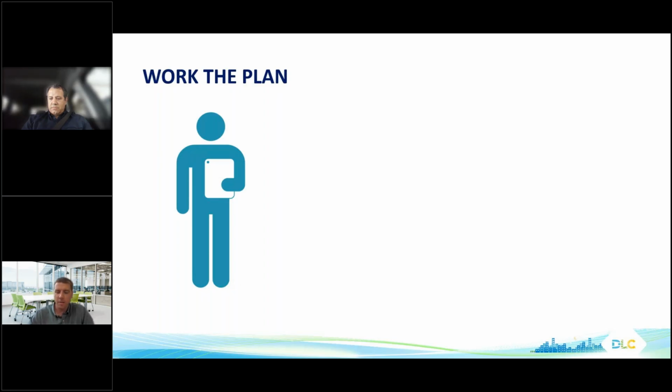And then lastly, communicate the plan to all the relevant parties: end customers, the person commissioning, installers, the IT department. And I say that because oftentimes, 2 out of 3 people involved will know what's going on, and then the third person struggles to execute the plan. So those are the takeaways for making the plan.